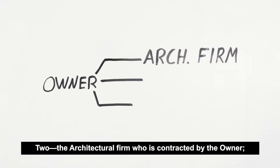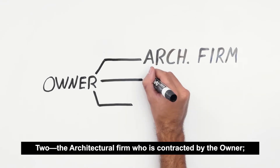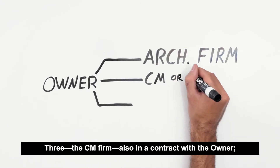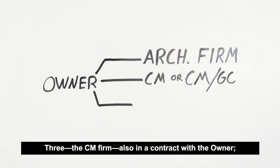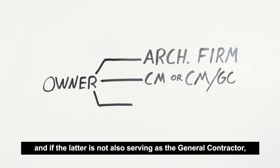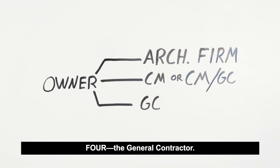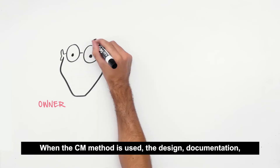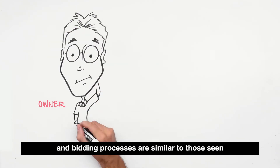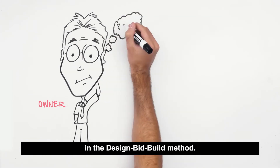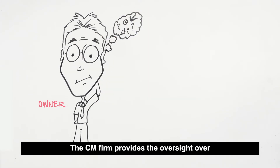The entities are: one, the owner; two, the architectural firm who is contracted by the owner; three, the CM firm, also in a contract with the owner; and four, if the CM firm is not also serving as the general contractor, the general contractor. When the CM method is used, the design, documentation, and bidding processes are similar to those seen in the Design-Bid-Build method. The CM firm provides oversight over all of these processes for the owner.